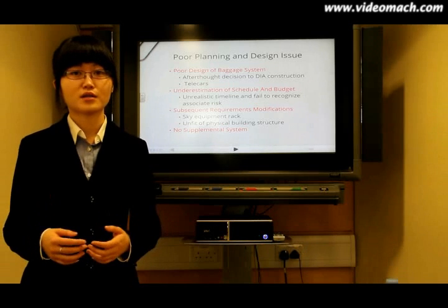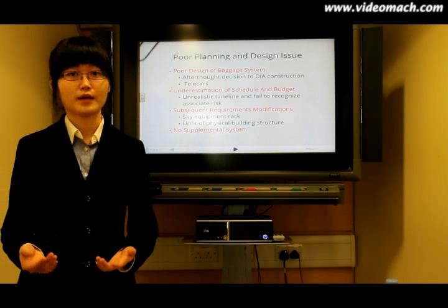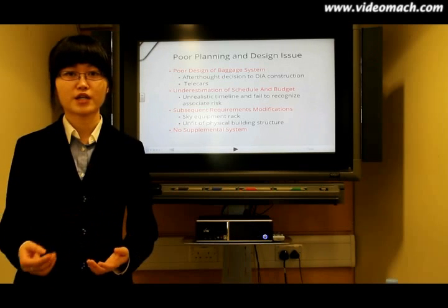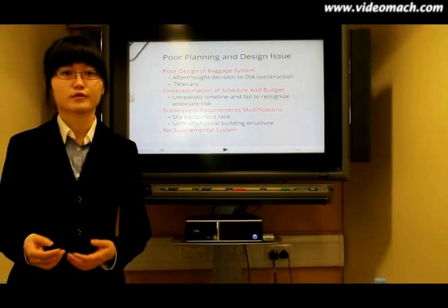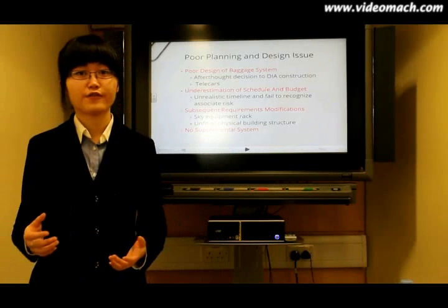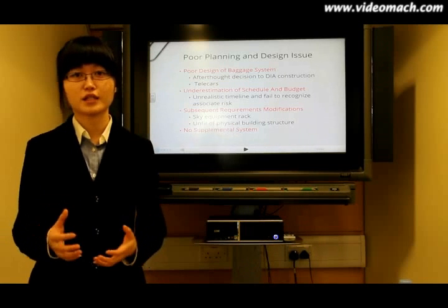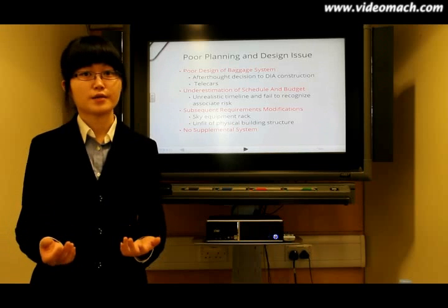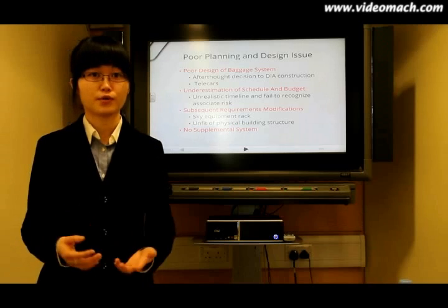They also had an unrealistic timeline and failed to recognize the associated risk. They did not understand the complexity of the project and overestimated the ability of implementation, and therefore they had to delay their project for 16 months. Also, they changed the design after they found the physical building structure unfit, and they added the ski equipment racks after work had already completed. This implies the management did not take responsibility for the project and get involved with the project.